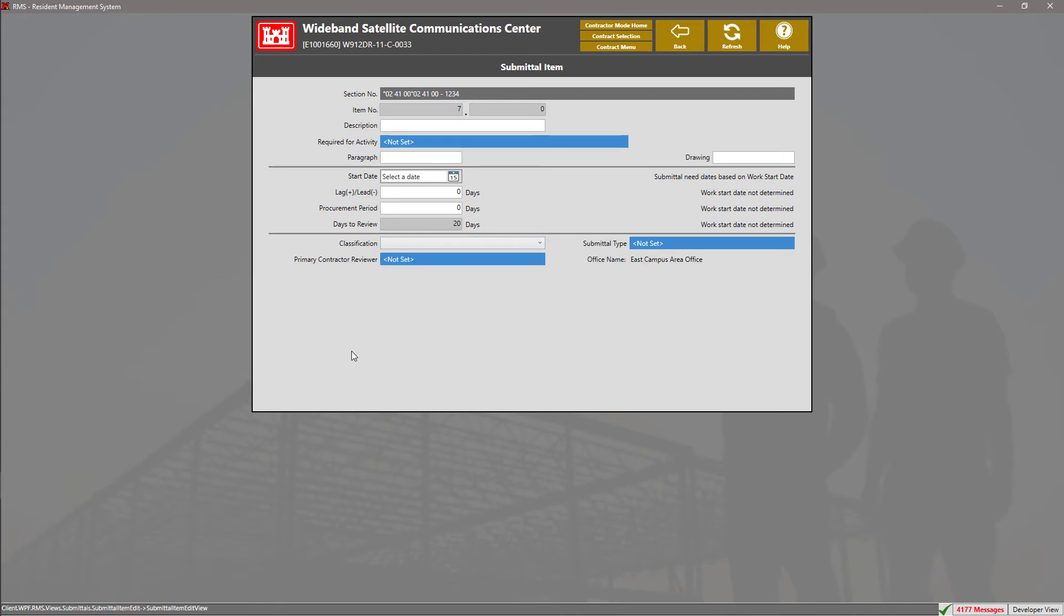Lastly, you can set the primary contractor reviewer and submittal type by clicking on the blue tiles, then selecting the appropriate primary contractor reviewer and submittal type.